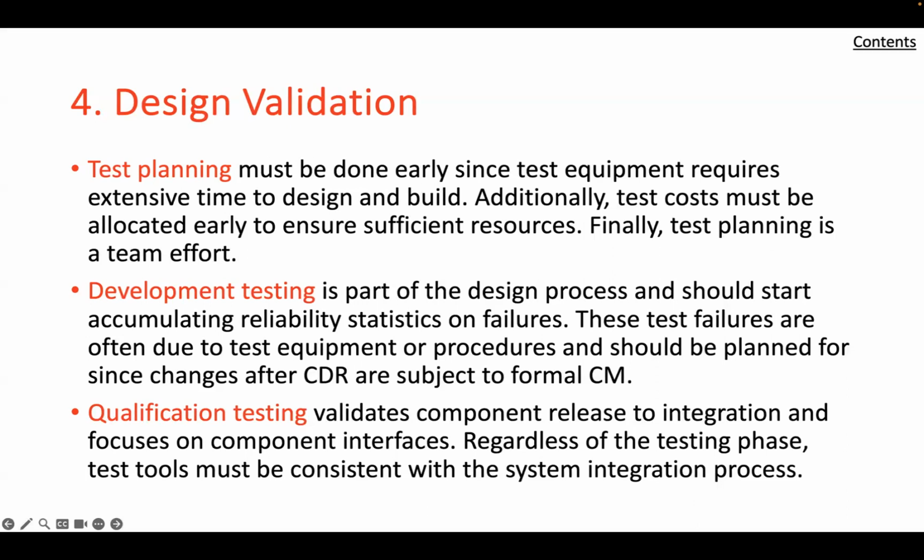An important lesson that system engineers must learn is that the apparent failure of a component to meet some test objective may not be due to defective design, but rather to a deficiency in the test equipment or test procedure. This is especially true when a component is first tested in a newly designed test setup. The need for testing the test equipment occurs all too frequently.